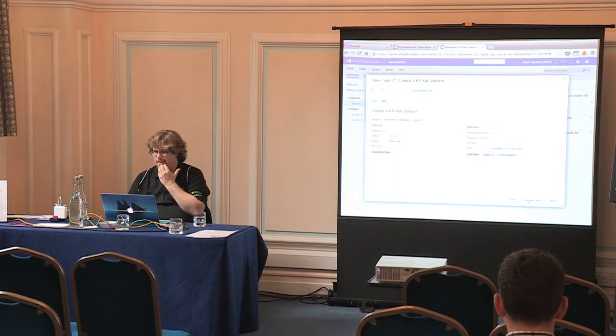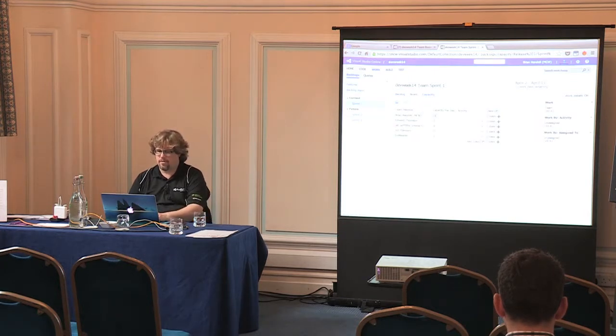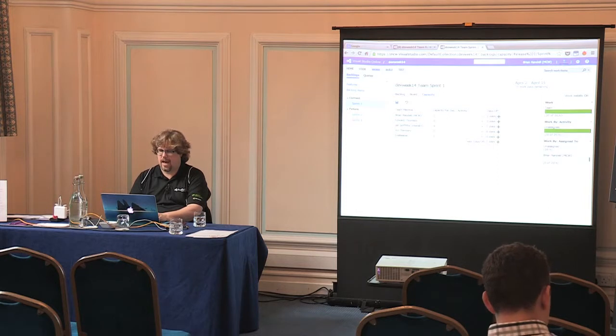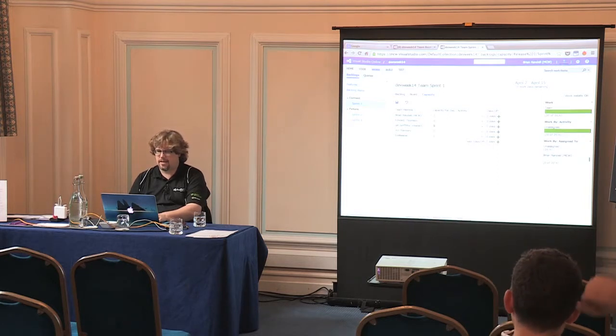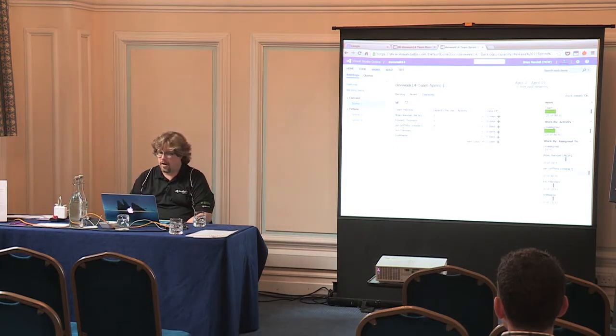All right, and we'll come over here and we'll add those. And what you can do is here, you come to your team, and based upon your team's contribution, can specify how much capacity they have. As I set their capacity, we see the hour bars increase over here. And if you want to, you can specify the activity, and those will add additional activity bars on the bottom.